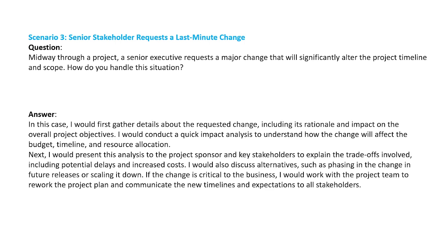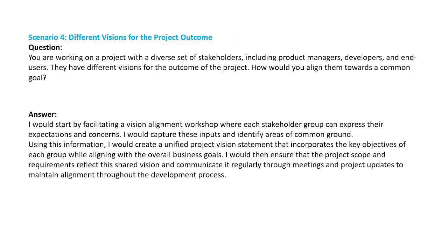I would also discuss alternatives such as phasing in the change in future releases or scaling it down. If the change is critical to the business, I would work with the project team to rework the project plan and communicate the new timelines and expectations to all the stakeholders.